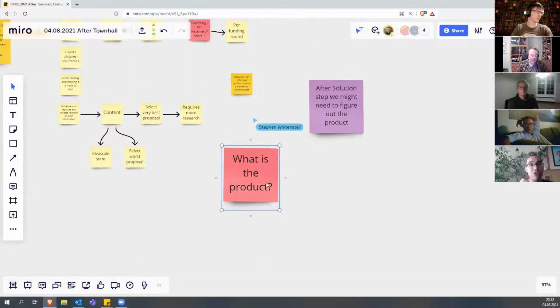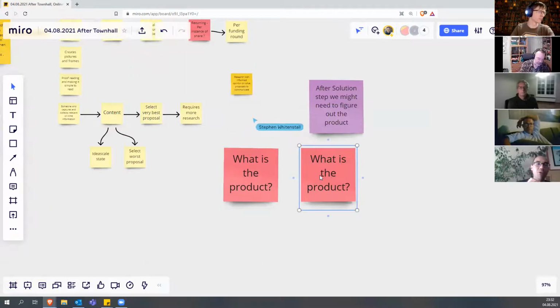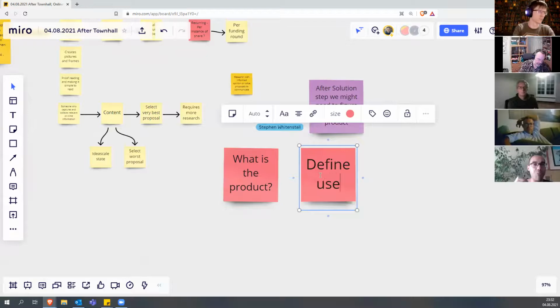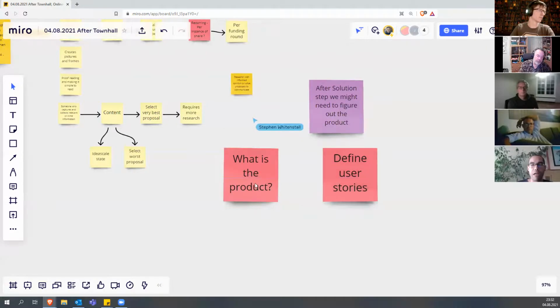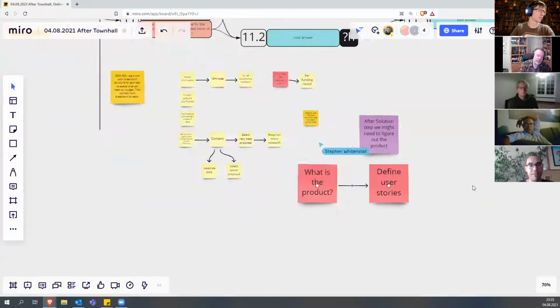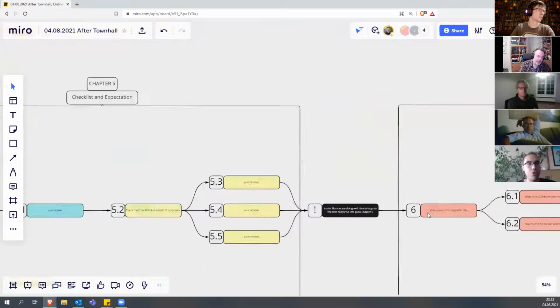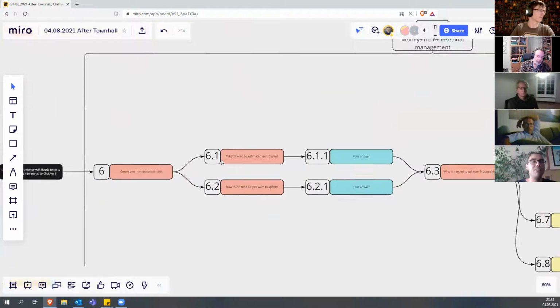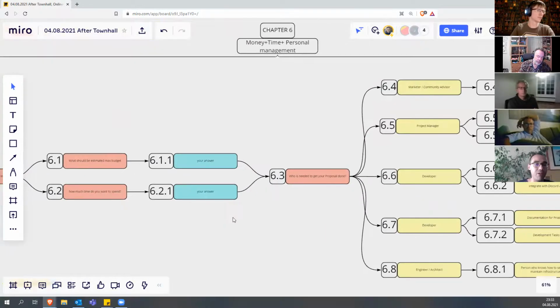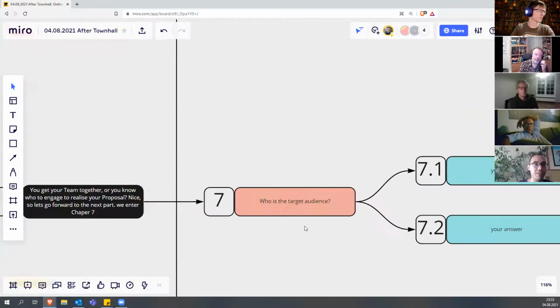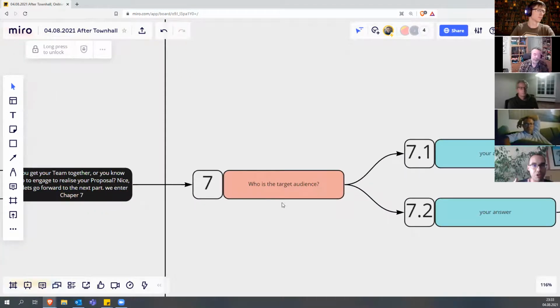There's one thing that I do like about agile: if you think you have a good product, then you should be able to say, I will use this product to do this, like I will use my cell phone to call Yoram. If I can't explicitly say something that clear, then my product isn't defined enough. The mechanisms of interaction with that product are not defined enough.